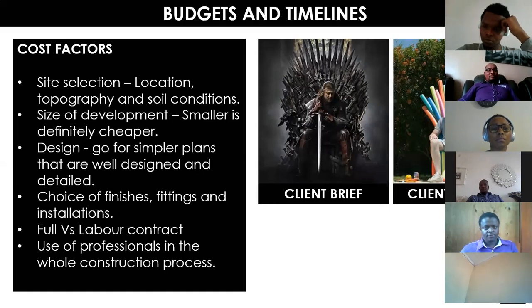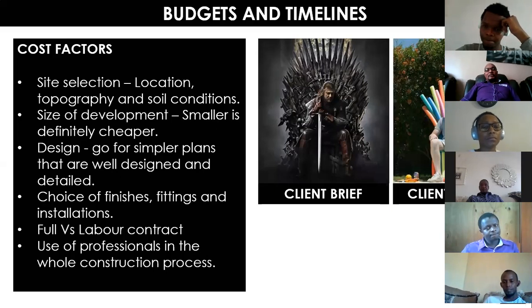You can end up with very poor quality of works because you take up the whole risk of the project. If something goes wrong in a project, if it was a full contract, you just go and ask the contractor to demolish and repair. But if it's a labor contract, you still incur the costs because you're the contractor. So there are those risks that you need to look at as you decide the direction to go. But definitely, if you understand the trade, if you know what to do, then a labor contract is usually cheaper than when you give out a full contract.